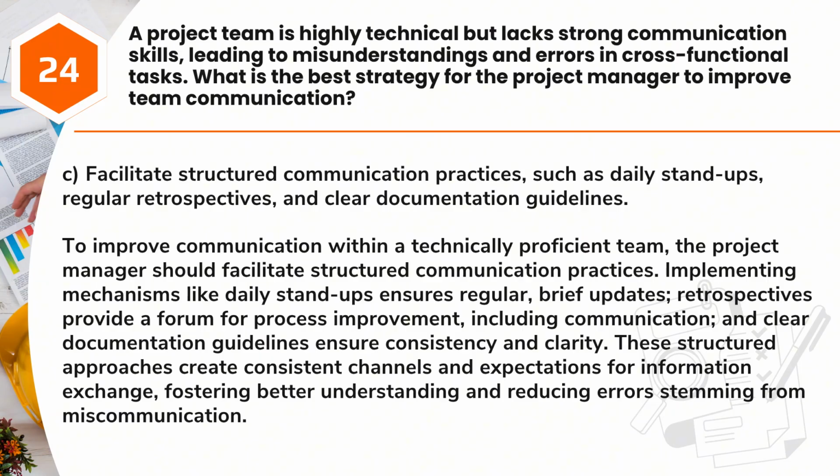To improve communication within a technically proficient team, the project manager should facilitate structured communication practices. Implementing mechanisms like daily stand-ups ensures regular, brief updates. Retrospectives provide a forum for process improvement, including communication, and clear documentation guidelines ensure consistency and clarity. These structured approaches create consistent channels and expectations for information exchange, fostering better understanding and reducing errors stemming from miscommunication.